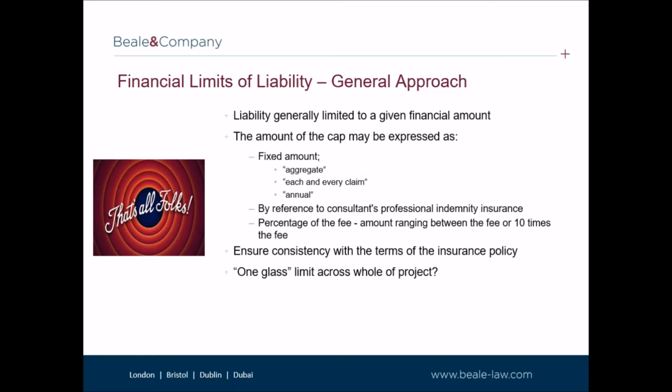We commonly see a financial limit of liability clause stating that the amount of the aggregate limit is the professional indemnity limit of indemnity to be maintained, but this is expressed on a per claim basis. So the two clauses effectively are not joined up. So depending on the drafting, there can be a conflict, and this does create some uncertainty. So the drafting needs to be carefully worded.